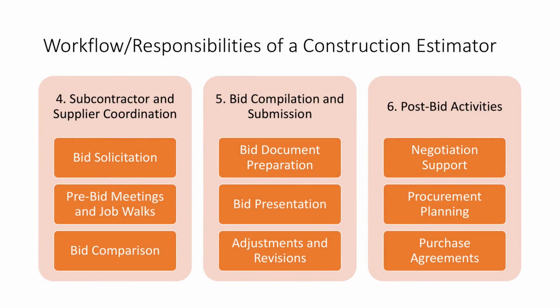Then you talk to contractors and subcontractors because you will have working relationships with contractors over time. When you are planning to offer a new project, you contact them and you say, hey, I have this project going on and I want to do the windows and doors. How much is it going to cost for me to do that if you are going to be my subcontractor on that project? So the estimator's role is really to send out invites to subcontractors to get numbers from them. And it's more like a smaller bidding happening at that stage.